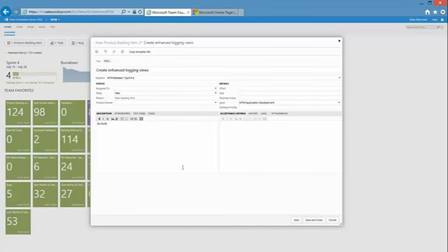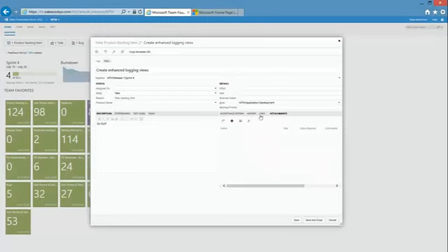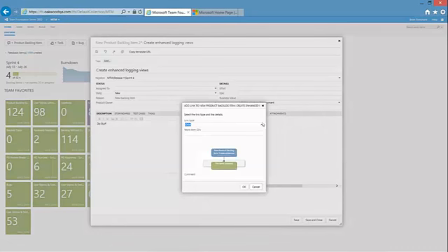You bet. So we have some user stories built up in here. We would define our acceptance criteria, which is terribly important. That's going to be our view for what is a successful delivery of this user story. What I like to do is allow our business analysts to go in and add some attachments, any kind of supporting artifacts that we might need in order to decipher what that acceptance criteria is. If we have any other related user stories, we might come in here and add a link to them. So we can go through and set that up right in here.